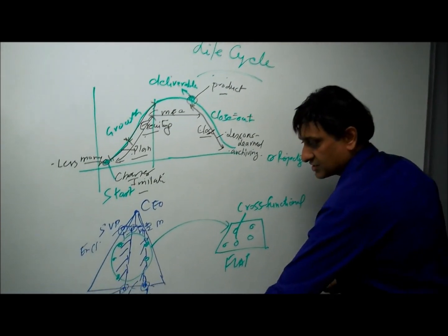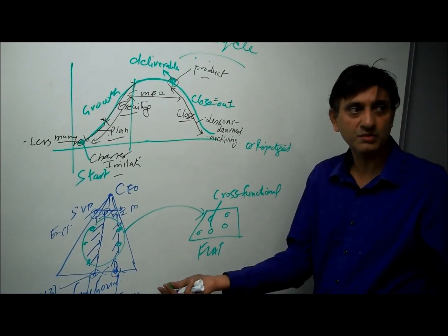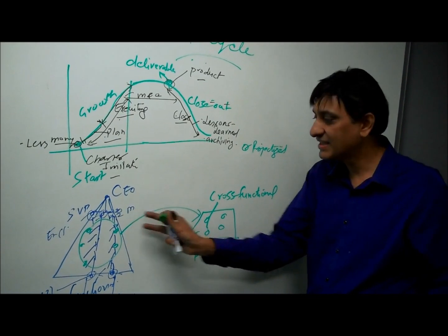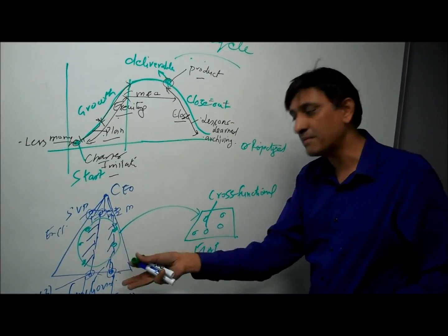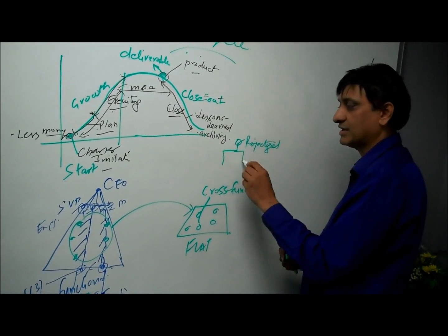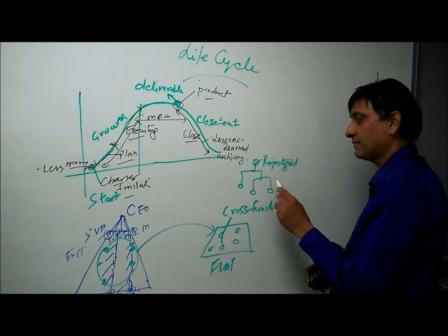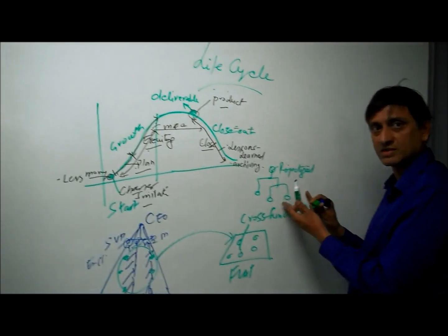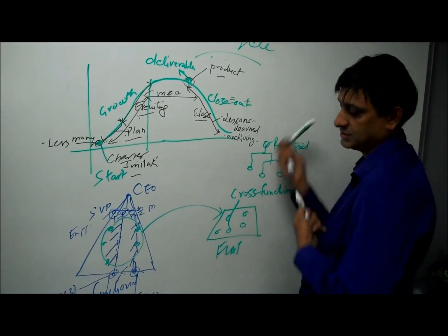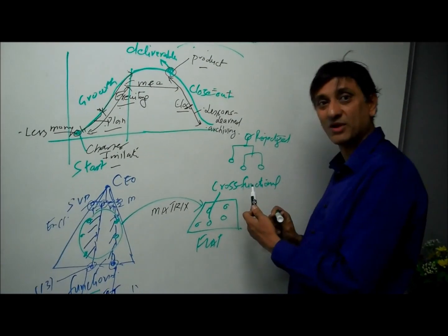That is versus a functional structure, where the project manager is virtually not in control of the project at all. He or she is actually a part-time person, doesn't have resources, doesn't have budget. It's just helping a functional manager implement the project on a part-time basis. Versus here in a projectized scenario, the project manager has their own hierarchy. They have a PM of PMs, under them a PM, a junior PM, and they have full-time staff, they have resources, they have budget, they have everything. In between the two is a matrix structure, which is a mixture of functional and projectized.